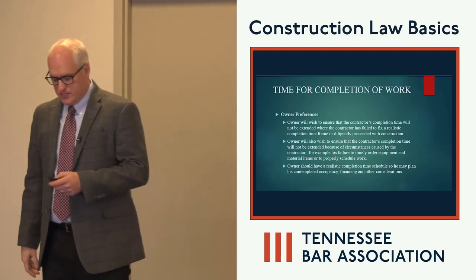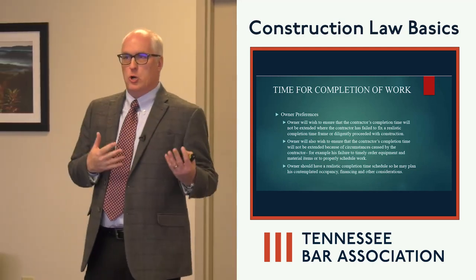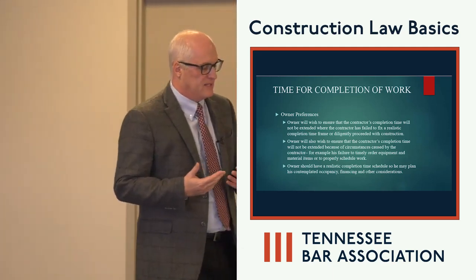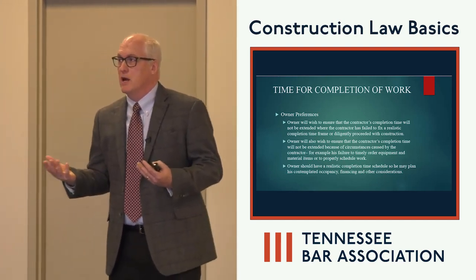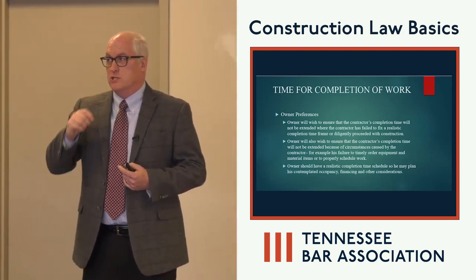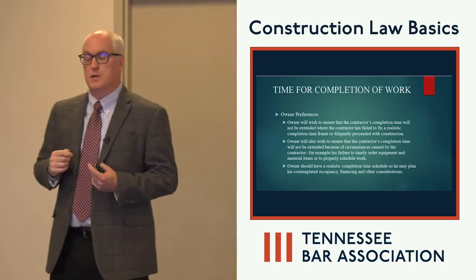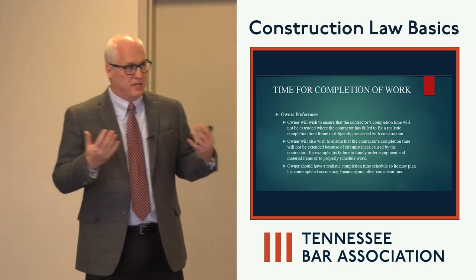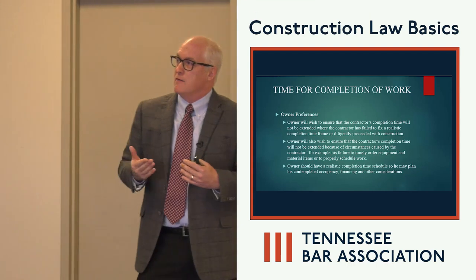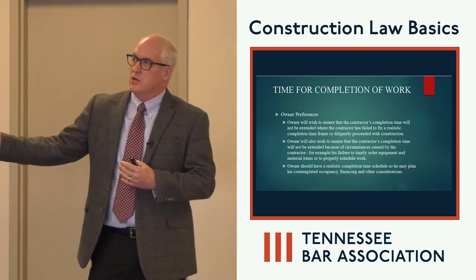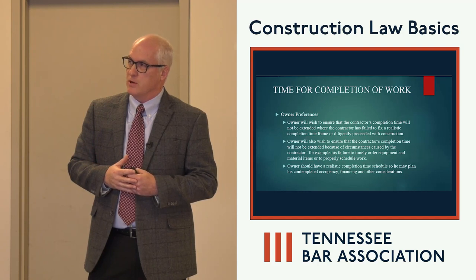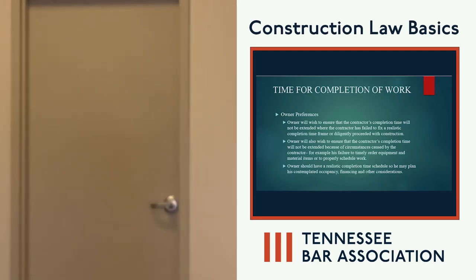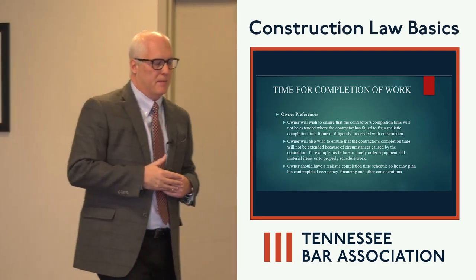I think if you're looking at preferences between an owner and a contractor, the owner is going to want a set period of time for their house to be completed, obviously. Most construction loans are 12 months, typically. And so the owner is going to want their house to be completed within that 12-month period. Obviously, on those construction loans, you've got interest only a lot of times for that 12-month period on the construction draw. If it's not extended, the bank is not gracious enough to extend it past that 12-month period, then that's going to convert to a conventional P&I payment.